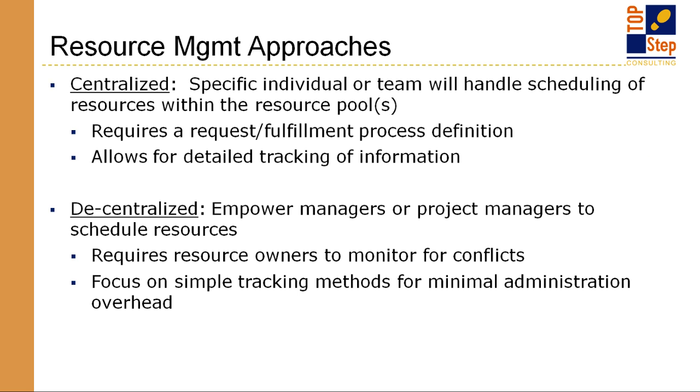In a decentralized model, you're going to have your resource managers or project managers manage any conflicts that arise, if someone asks for the same resource at the same time for different projects, those types of things. You need to have that conflict resolution process in place as well as an escalation process if needed. And decentralized can also lend itself to more simplistic tracking depending on how you're going to implement that model.